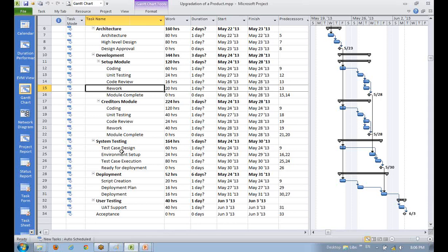Okay. In general, in MSP these dependencies would start all the successor tasks. However, the decision that there should be lag or lead can be achieved through lag or lead, or through prioritization. So how should we finally plan with this requirement in mind, that with limited resources we should not start everything together? Let's first do these 3-4 tasks, and then the same people can start doing those tasks.